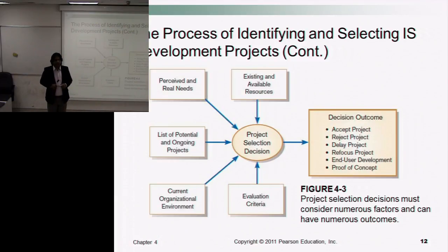Yes, we assigned weights after identifying requirements and constraints, and then we gave a rating for each alternative solution. Then you multiply the rating with the weightage, calculate its score, and based on the score I can select the project.